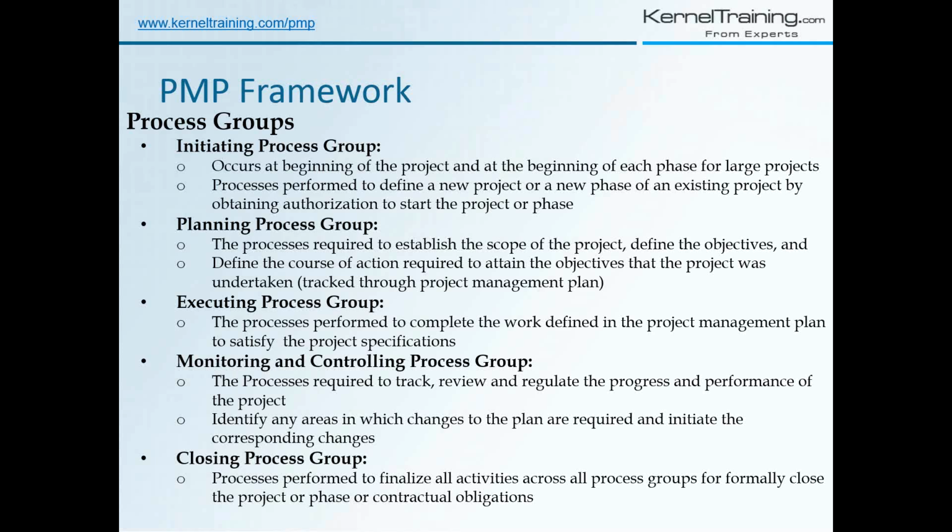Next, the deliverable will go to quality check first, and once it is approved by quality check, then it goes to validation of scope, that is for acceptance from the customer. The next process group after monitoring and controlling is closing. Once the customer has accepted the deliverable, it goes to closing process group as an accepted deliverable.